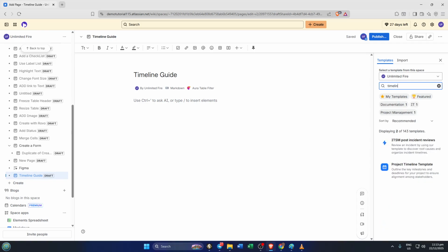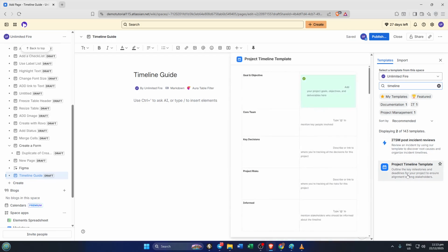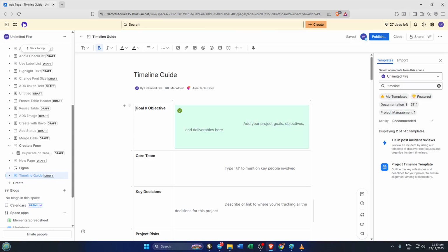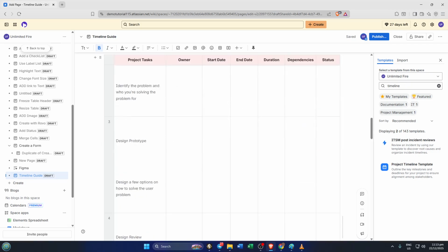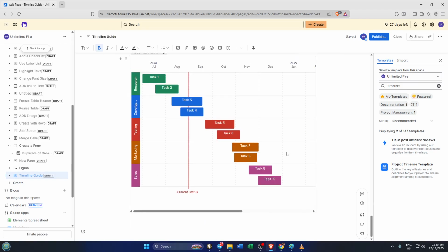For example, you might create a series of sticky notes for tasks like research, design, and testing. Then use arrows or lines to indicate which tasks come after one another. This visual structure not only helps you stay organized, but it also gives your team a bird's-eye view, kind of like mapping your route before a big road trip so there are no surprise detours.